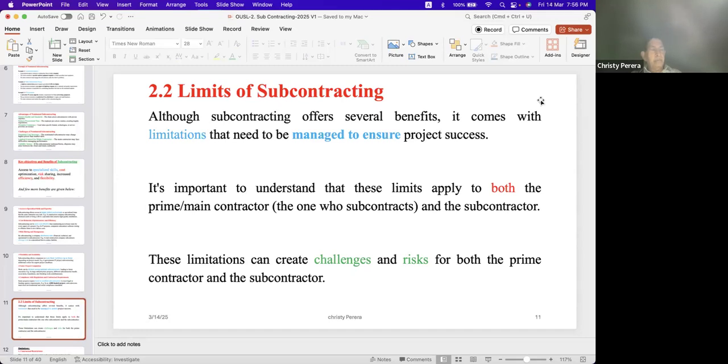Now, sometimes in some bidding documents we mention some areas. Depending on the nature and the other standards, the subcontract percentage might change. Sometimes we put a condition saying, if you want to do more than the limit, I mean, more than 30%, you will have to get the approval from the client.